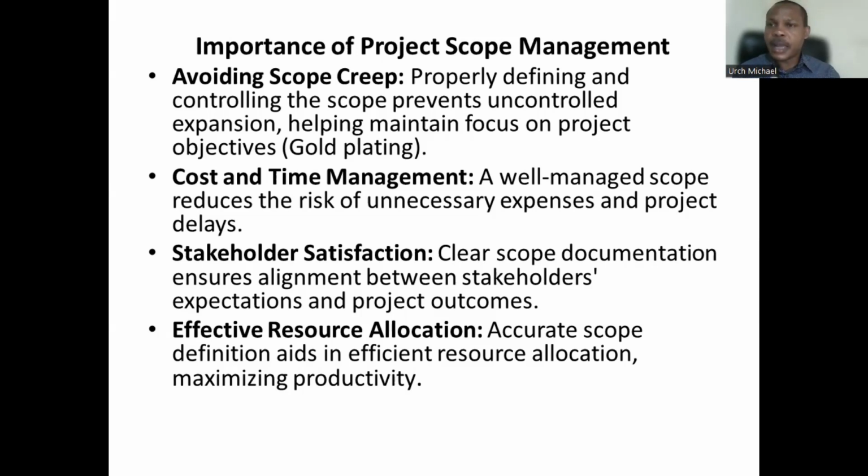Okay, and if you're also planning for your materials for that area of the road, you're going to be guided by the scope as well, because all you need to do is take the length, the breadth, and the depth of the road and multiply. It's going to give you the volume of the material requirements, based on the scope that has been defined.